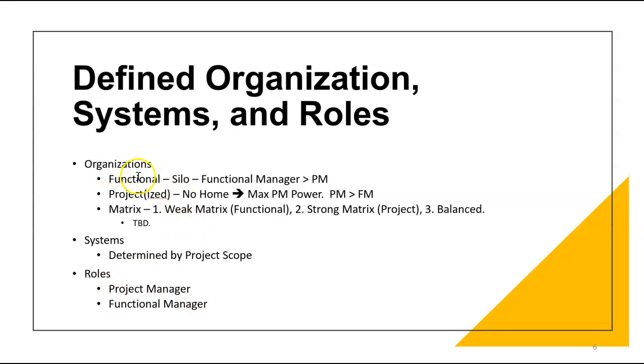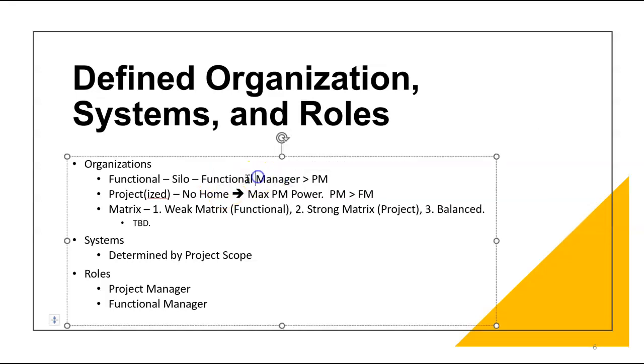But are you working in a functional organization where you might have straight up vertical lines, right? Where the functional manager has the ultimate power, and others have to form relationships with them. The functional manager owns the resources, owns the budget. They own the experts, and other managers, like a project manager, have to learn to work with them, to request resources, to create a relationship. That's called a siloed organization. You might have maintenance in one silo, operations in another silo, intelligence in another, or research in another silo, right? And so it's going to change your power and authority and how you interact with each other.